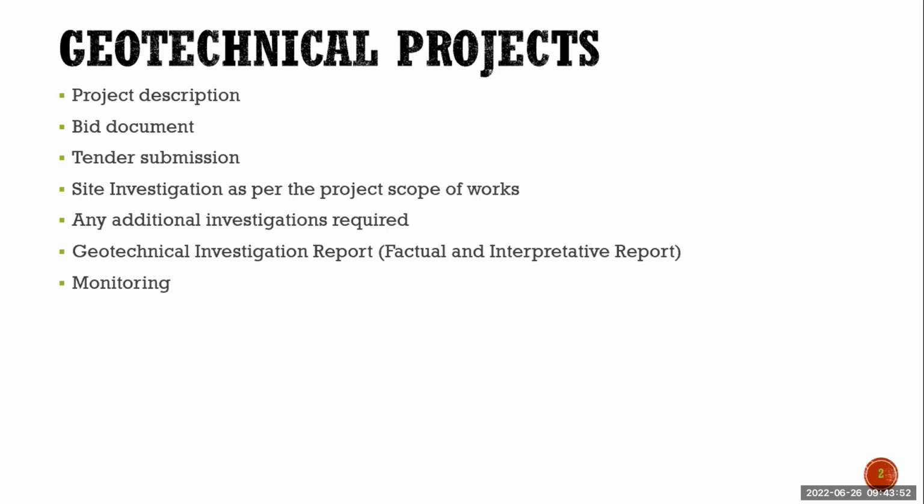Once the bid document is ready, it will be sent to the geotechnical contractors. Whoever is within that particular region, the engineers will send it on behalf of the client to the geotechnical contractors. Then they will give their prices for these tests. That will be a tender submission.